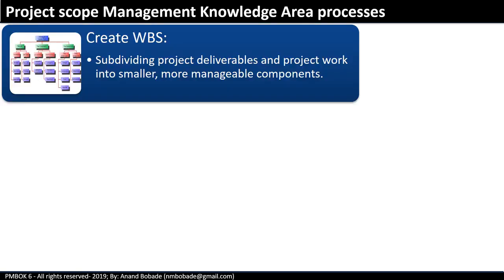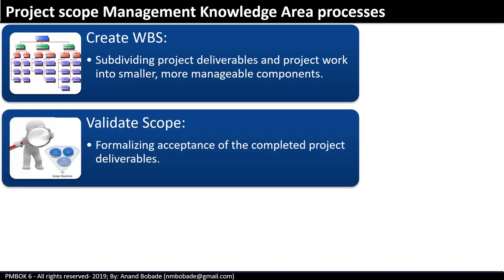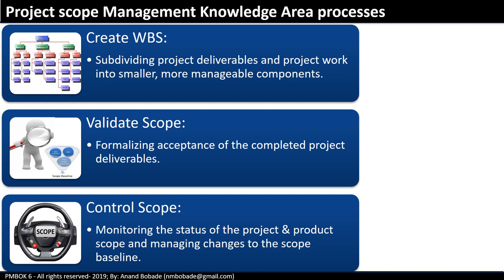Next is Create WBS (Work Breakdown Structure) — this is the process of finalizing the scope baseline, so the output of Create WBS is the scope baseline. Then Validate Scope — this is the business acceptance process where you formalize acceptance of completed project deliverables from the business and obtain their signatures. Finally, Control Scope — the process of monitoring the scope status and managing changes to the scope baseline, since the scope will not always remain the same as defined at the beginning.